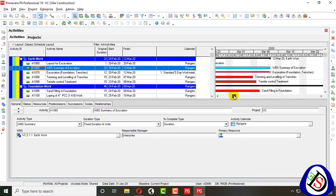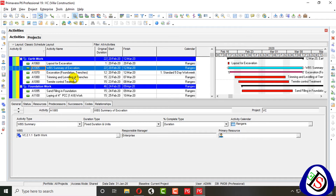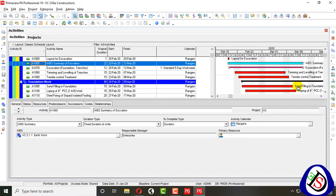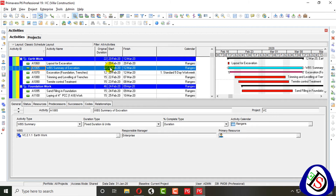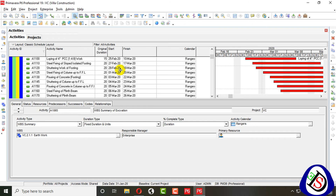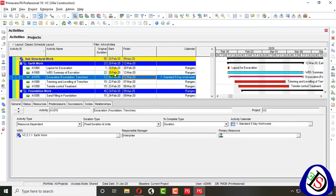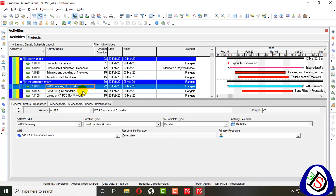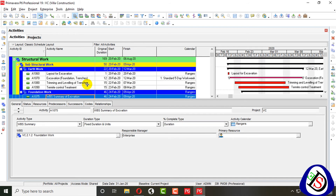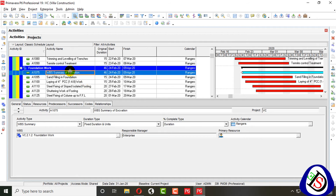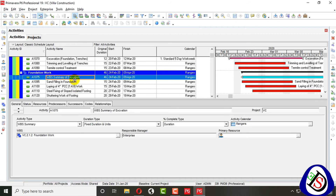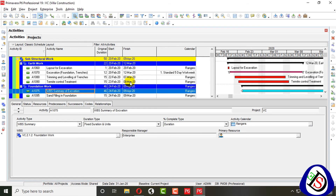When scheduled, the WBS Summary activity automatically calculates to 22 days, covering excavation, trimming, and termite activities — all done up to 12 March. The maximum date is 12 March and the earliest date is 20 February, so it spans that full range. This activity can be added in any WBS level, and its behavior and calendar can be changed accordingly.